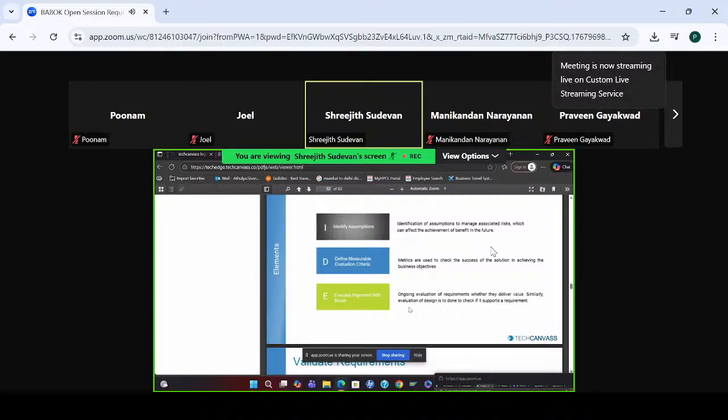In our example, we had that OTP feature. The feature is very good, but it was not aligning with the scope, business objectives, goals, and the business requirement. So you evaluate all the requirements, align them with the scope of the project, and accordingly finalize which requirements are in scope and which you need to mark as out of scope.